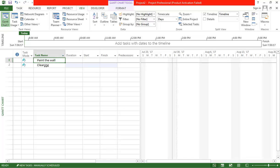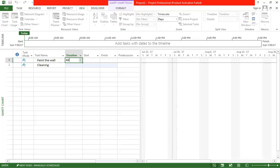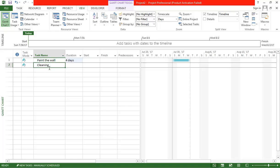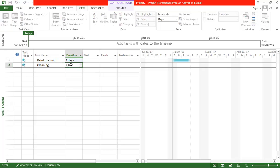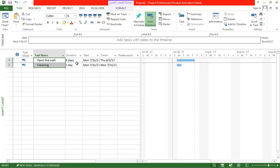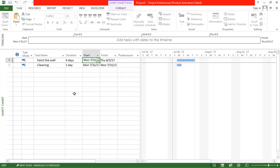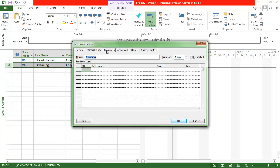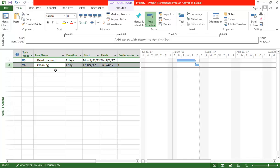These are the two tasks: 'Paint the Wall' taking four days, and 'Cleaning' in just one day. We will make both tasks auto-scheduled so that Microsoft Project handles the calculation. The first task starts on Monday and finishes by Thursday. For the second task, go to its properties, set the predecessor to the first task, and click OK — so the second task starts on Friday.